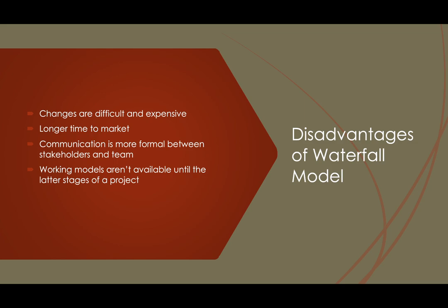The reason being, if you have worked in the waterfall model, you might know there are long change management processes involved. First, the project manager will go and get all the change requirement details from the stakeholders, and then document all those changes and relevant details, like what will be the impact of this change, whether any risk will be involved, when to schedule the change, and what the costs related to it are.